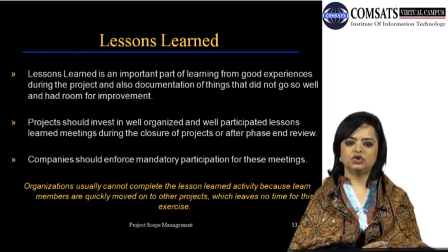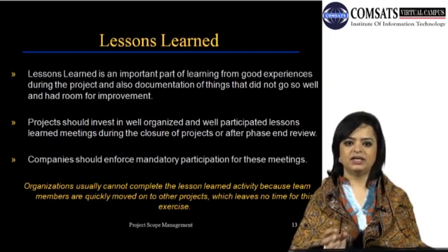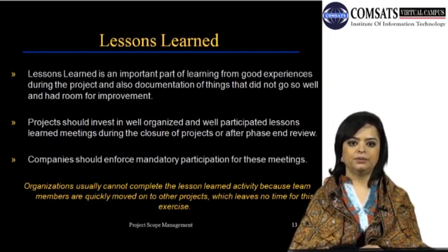Project managers should always have a line item as an activity for the lessons learned meeting, time for it, and ensure that participation from the right individuals is made mandatory.